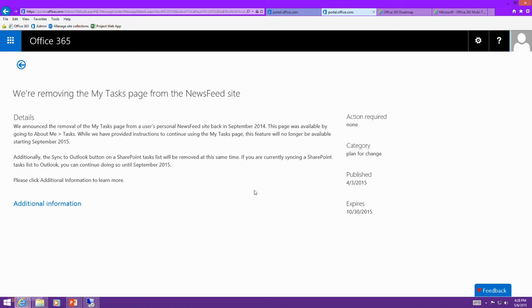It then also keeps it in the reporting store for analysis, which is what a lot of other organizations want. And then it actually has a really good third benefit. The way that Project Server and Project Online is written, our SQL queries to retrieve data are optimized on the security. So we optimize very quickly on a deny and get that filtered out very quickly. So you'll actually see improved performance by taking those archived projects into a denied security category.